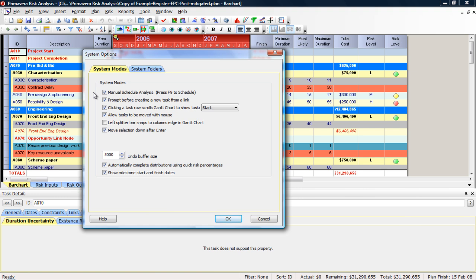If you have maybe a 200 line item file, or 1,000 line items, where it's very quick to reschedule, that might be okay to do live scheduling. Live scheduling would be more in line with Microsoft Project users, where you make a change and it recalculates the network, etc.